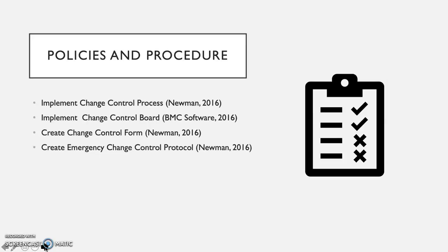There should also be a formalized change control request form for all requests. This would help keep a record of the changes that have been approved and denied, and it ensures proper bookkeeping in all departments. And there are always special circumstances that could warrant an emergency change. However, there needs to be protocol established from the start in order to be prepared for any such instance.